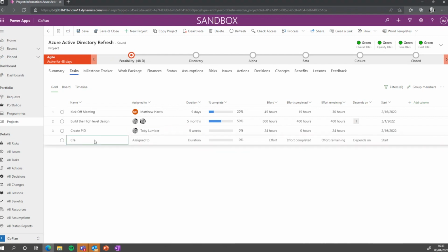So we're going to do gate 1, sign off as a gate here, and this is going to be assigned to Joel because I'm portfolio manager or whatever it might be. The other thing you can do in here is make them 0 days, and they effectively become a milestone. In Microsoft Project Desktop, they used to go into a little diamond. It doesn't really do that here on this page, but we'll come back to that later on. There's no effort assigned to it because it's a milestone, but we're going to make that dependent on.